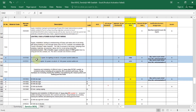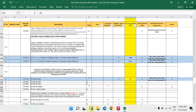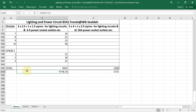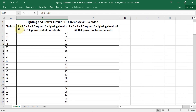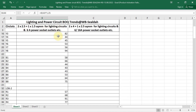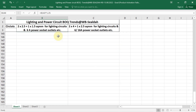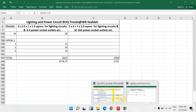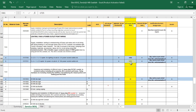Now, supply installation testing and commissioning of power sub-main circuit wiring. The wiring quantities to write down: for lighting circuit, 2x2.5 plus 1x1.5 sq mm — the total calculated is 4778 metres. For 6-amp power socket outlet wiring, the dimension is 1725 metres. Write down 4780 and 1725 for those items.